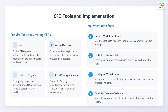Now let's see the implementation steps. First, define workflow states clearly — each stage in your process that work items flow through. Gather data on when items entered and exited each workflow state. Set up your chosen tool to display the cumulative count of items by state over time. Schedule regular reviews of your CFD to identify trends and take action.